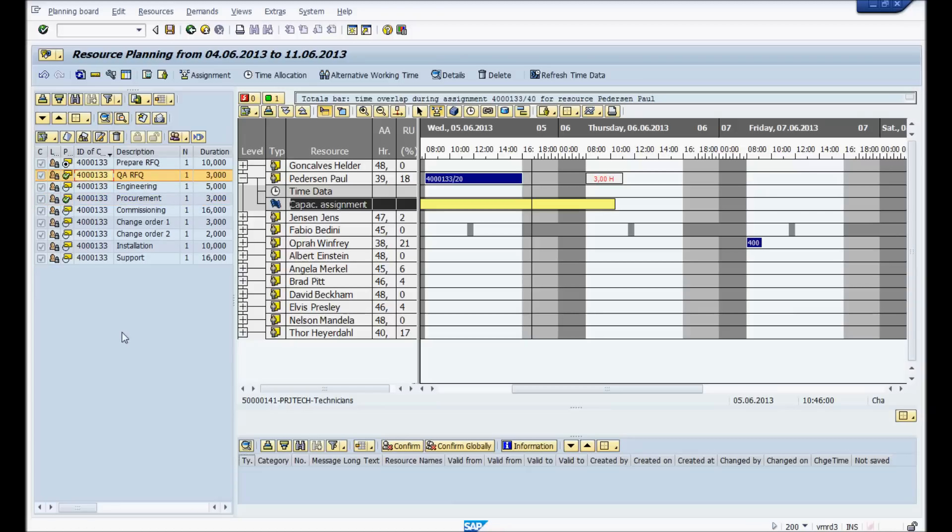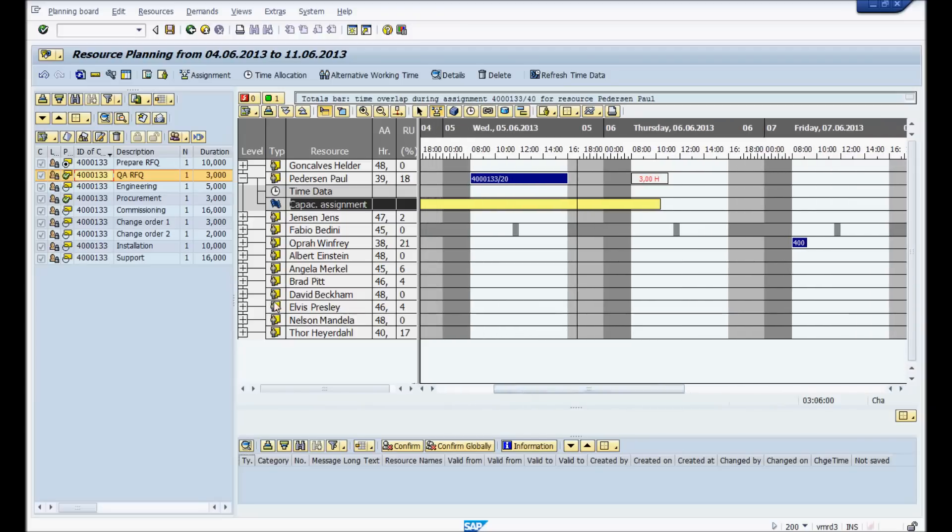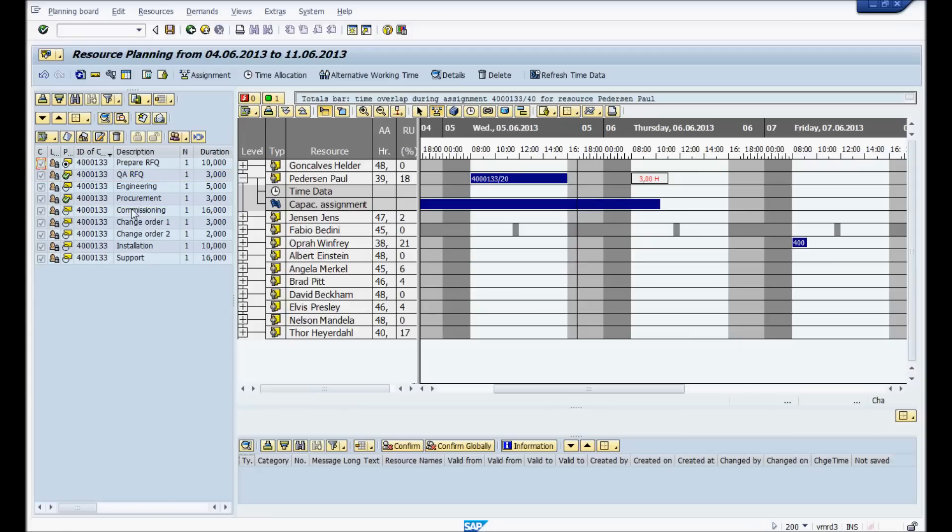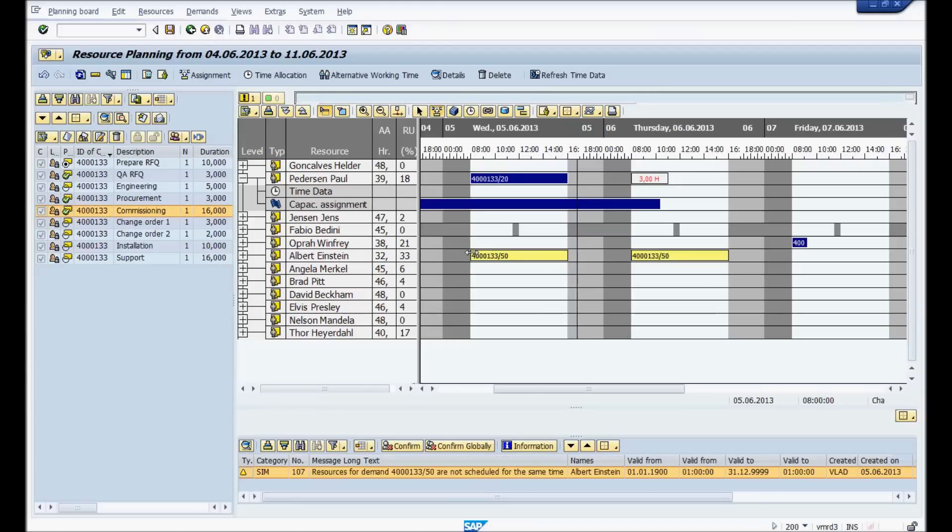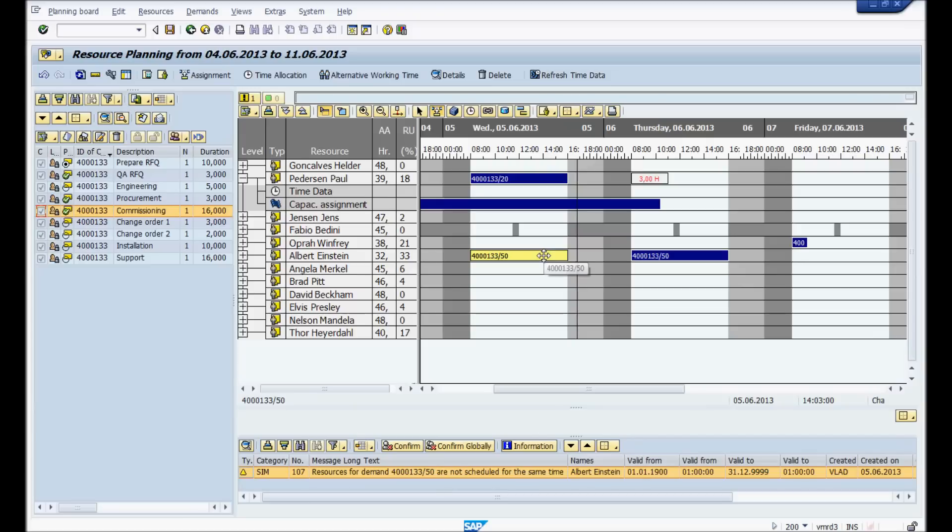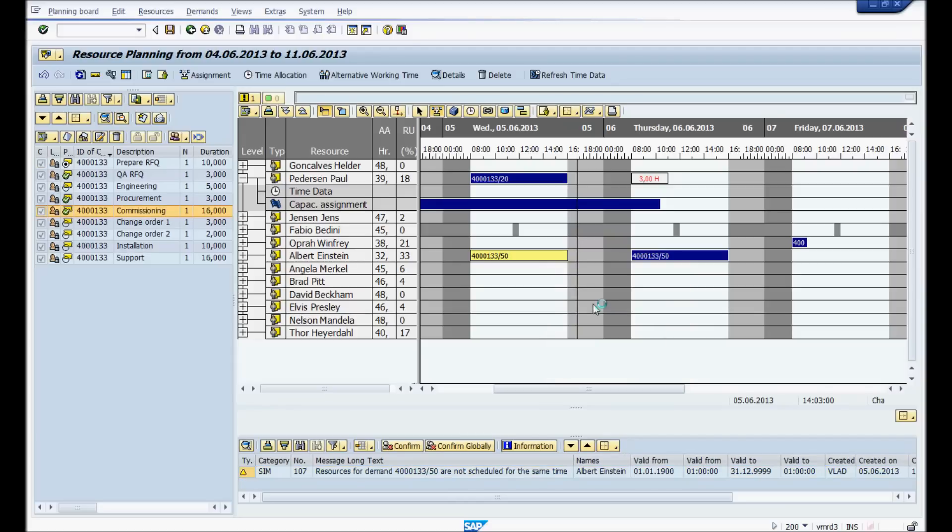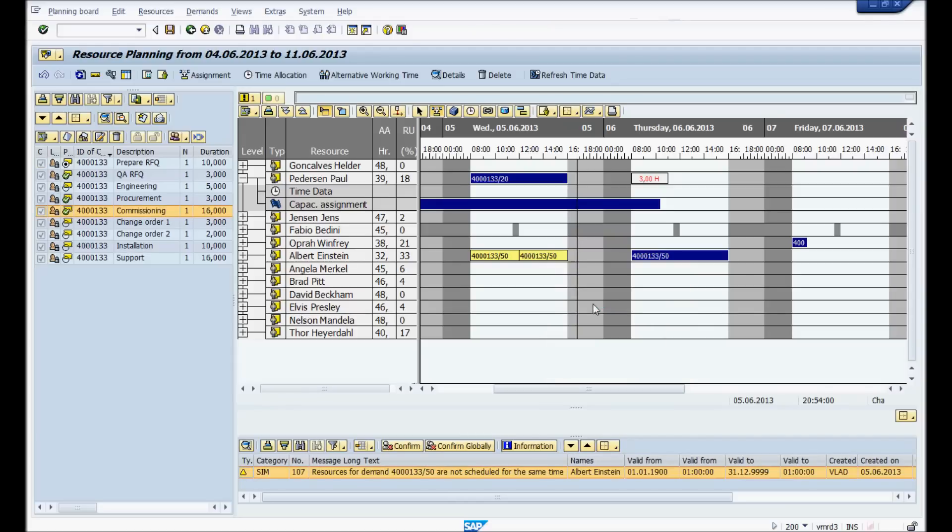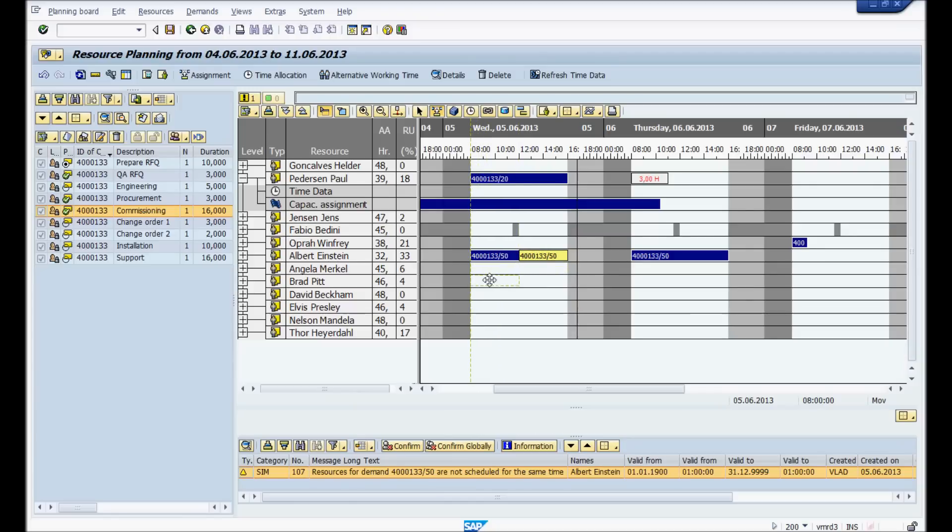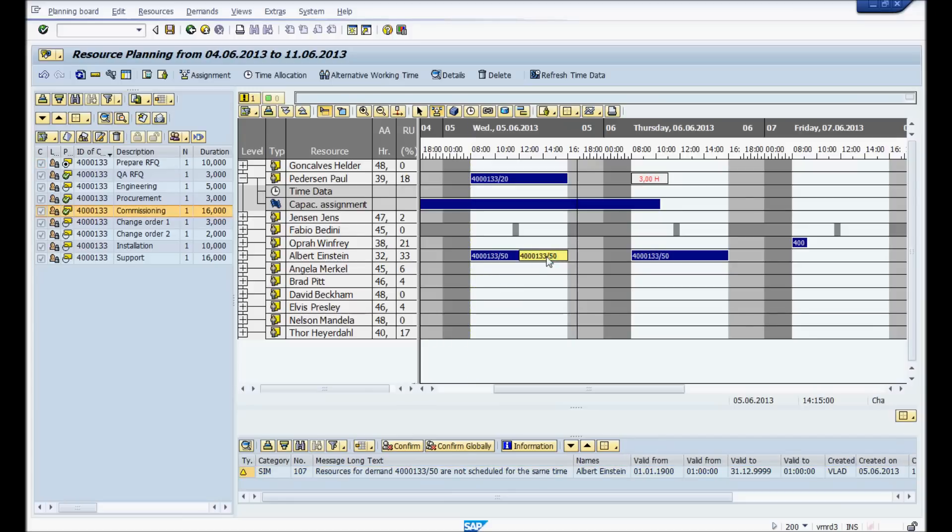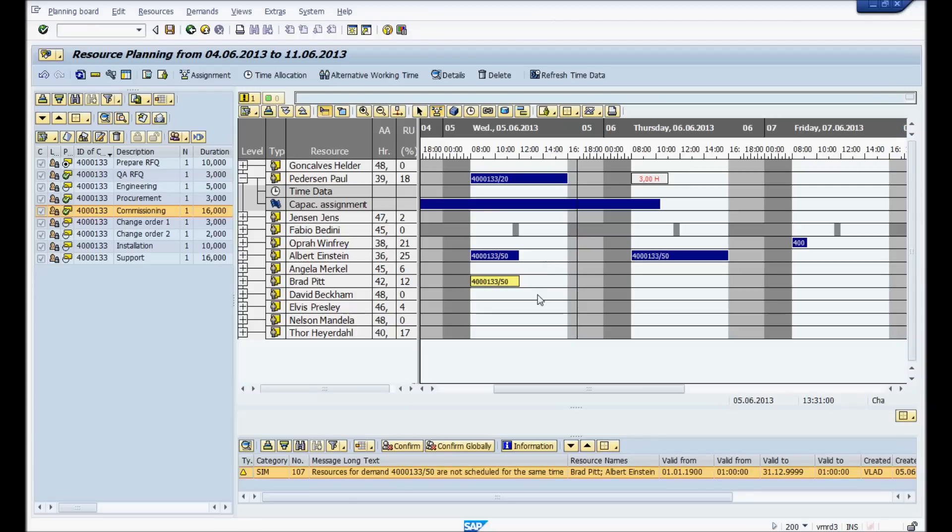Now a few other things you could do. You could take, we're going to take a longer operation here. So here we're going to take the commissioning is 16 hours, pretty big. So we're going to take, give it to Albert Einstein. And then what we're going to do, we're going to take the same operation right here today, because we need to do some of it today. And we're going to split it. So you just right click, you split. Once you split the assignment, you could take the next one. See here, I highlight it. And now I'm going to give it to Brad Pitt to do along with Angela. So here you go.